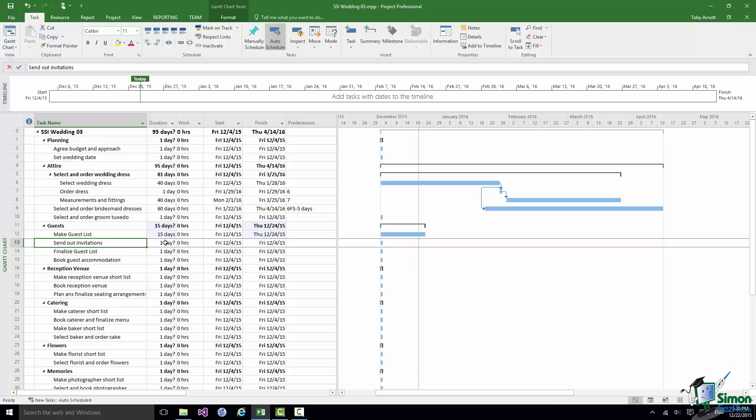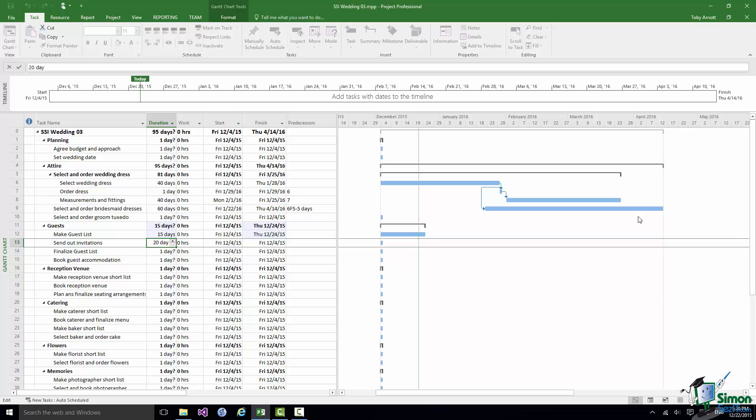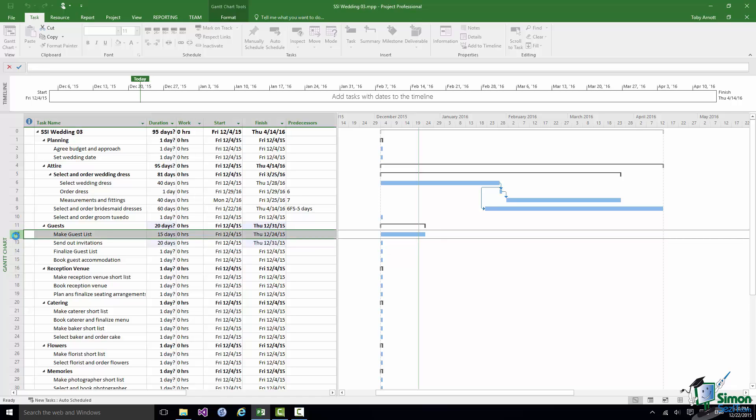So let's extend Send Out Invitation to be say a 20 day task. And let's say that it's going to start five days after making the Guest List starts. So once we've been working on the Guest List for a week we're going to start sending out the first batch of invitations and see what sort of responses we get.